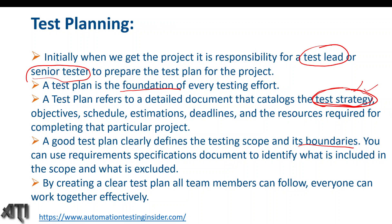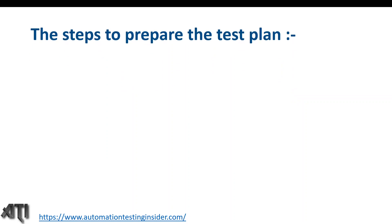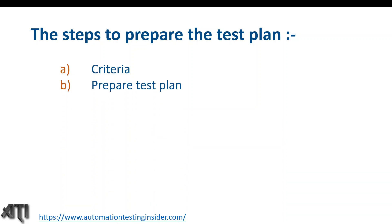The steps to prepare a test plan are: first, criteria or prerequisite criteria to prepare the test plan; second, prepare the test plan; and third, get the approval of the test plan from the test manager. Once the test plan is prepared by the senior test member or test lead, it should be approved by the manager or test manager.